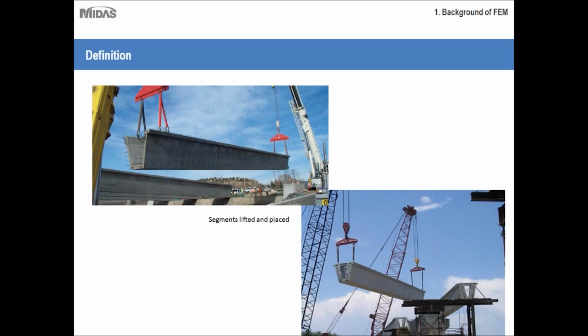And then once these segments are cast, they are lifted and placed onto the bridge. And this is a very important part of construction, as the segment lengths get longer and longer, they become heavier, and these segments are very heavy and they require special or heavy cranes to lift them. So in some cases it has been also seen, at some sites there have been some tragic accidents where the